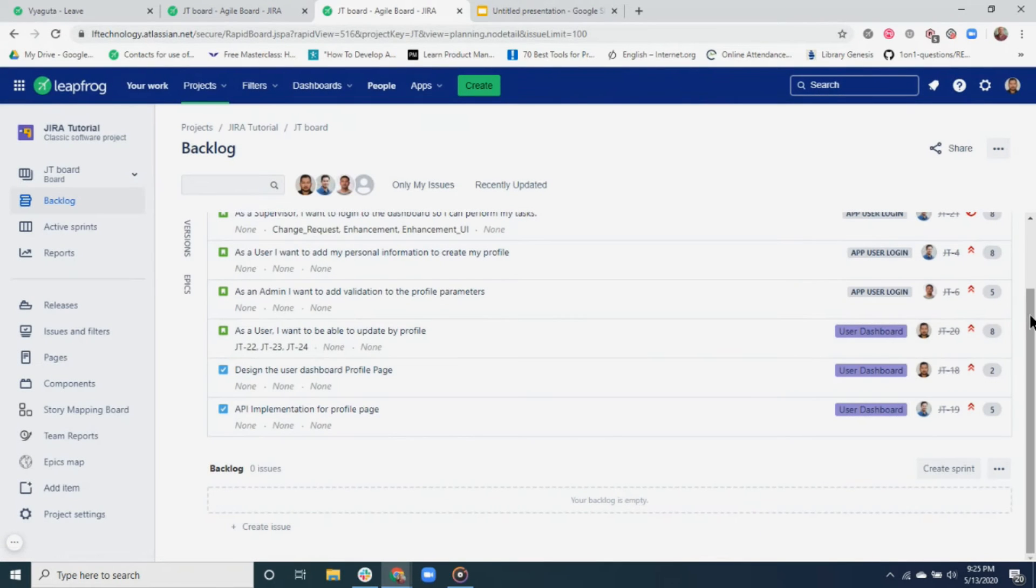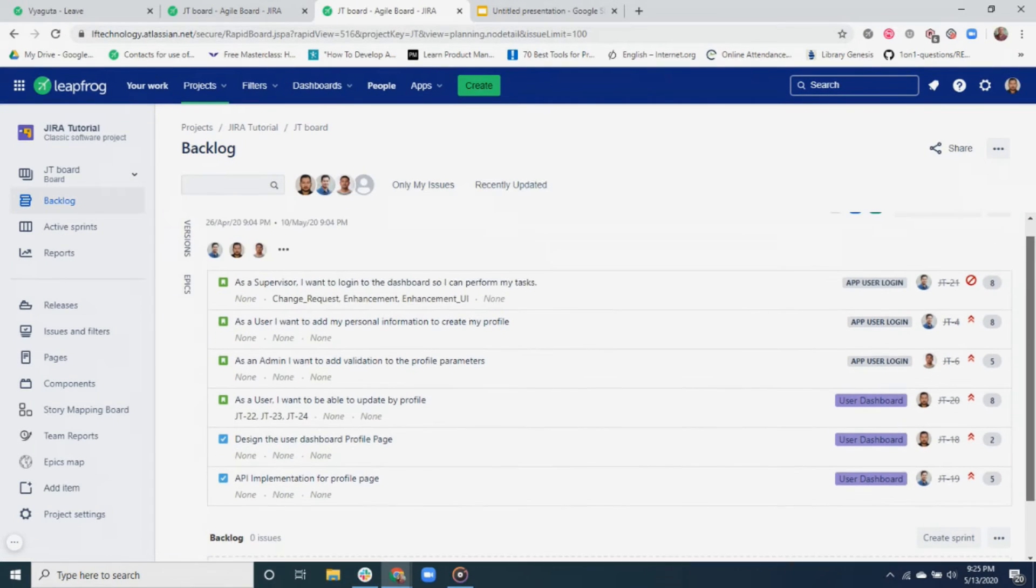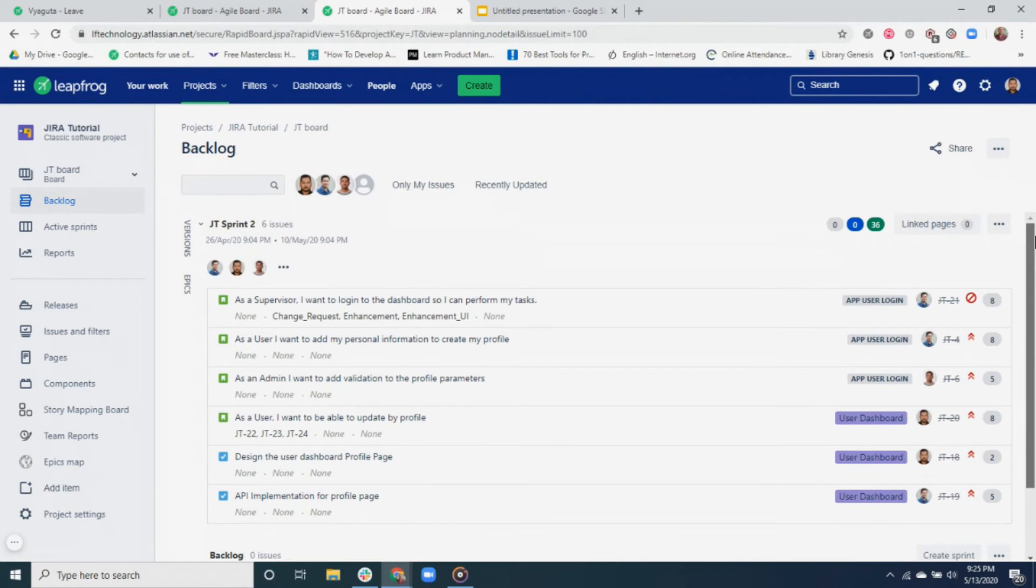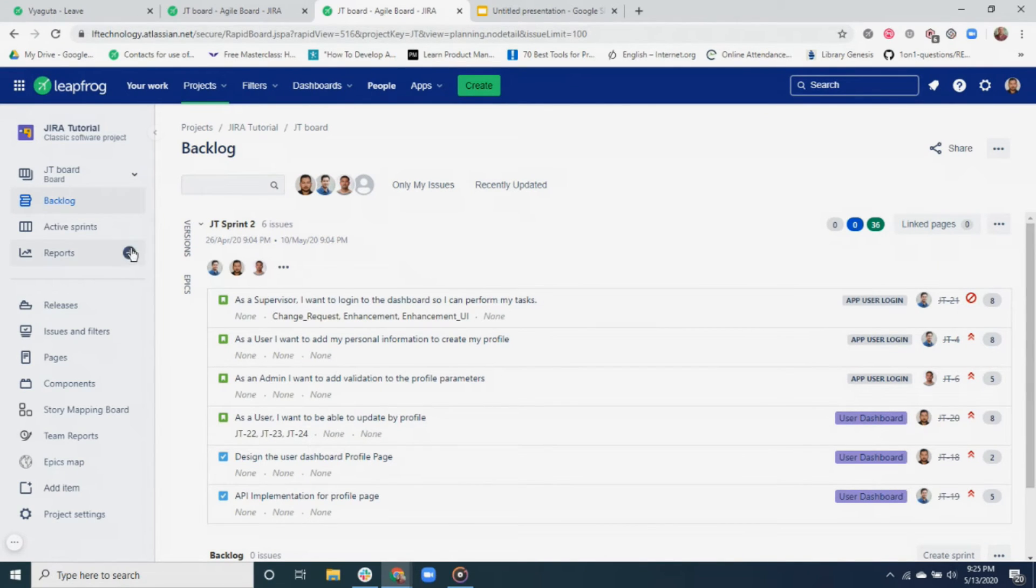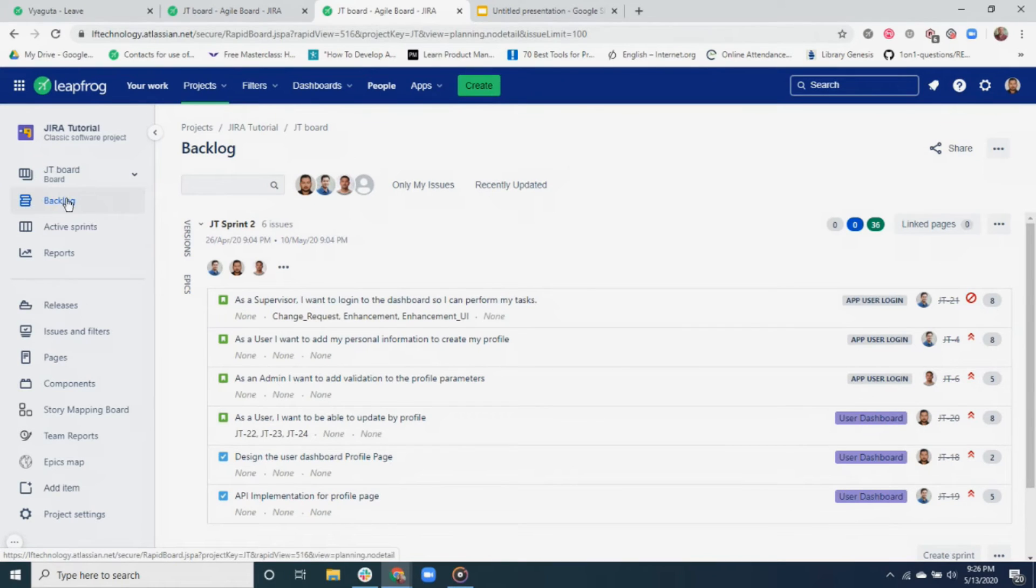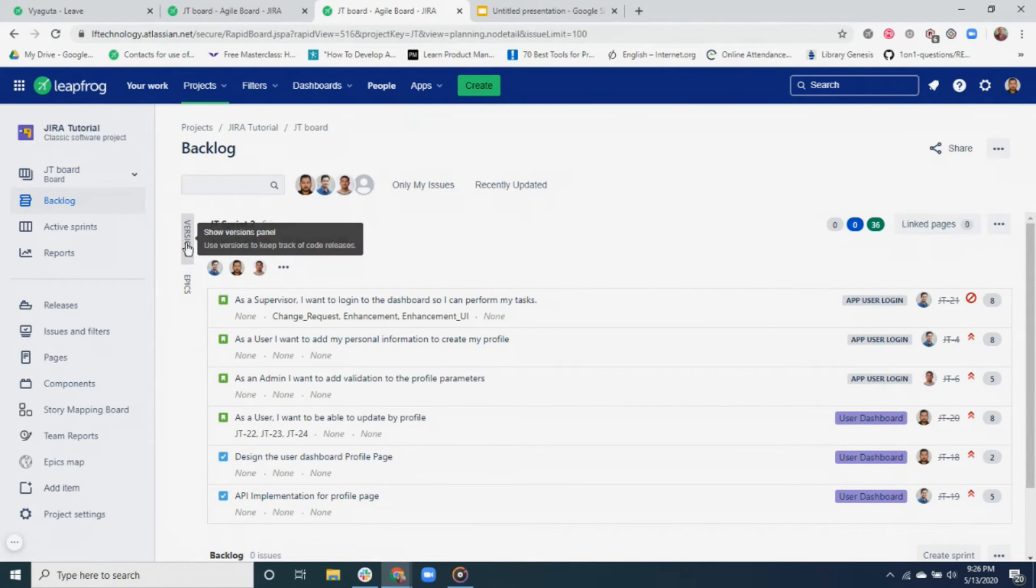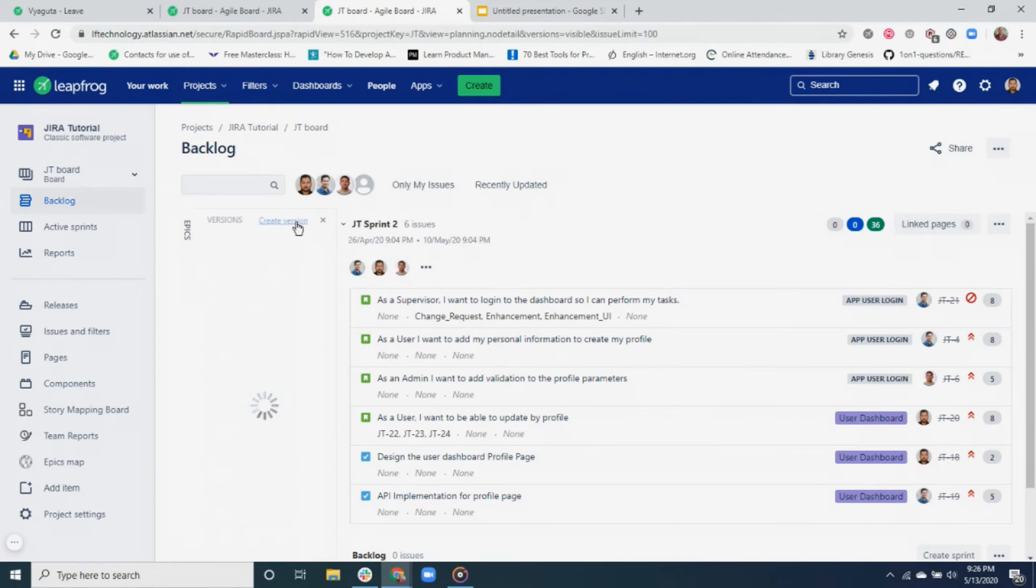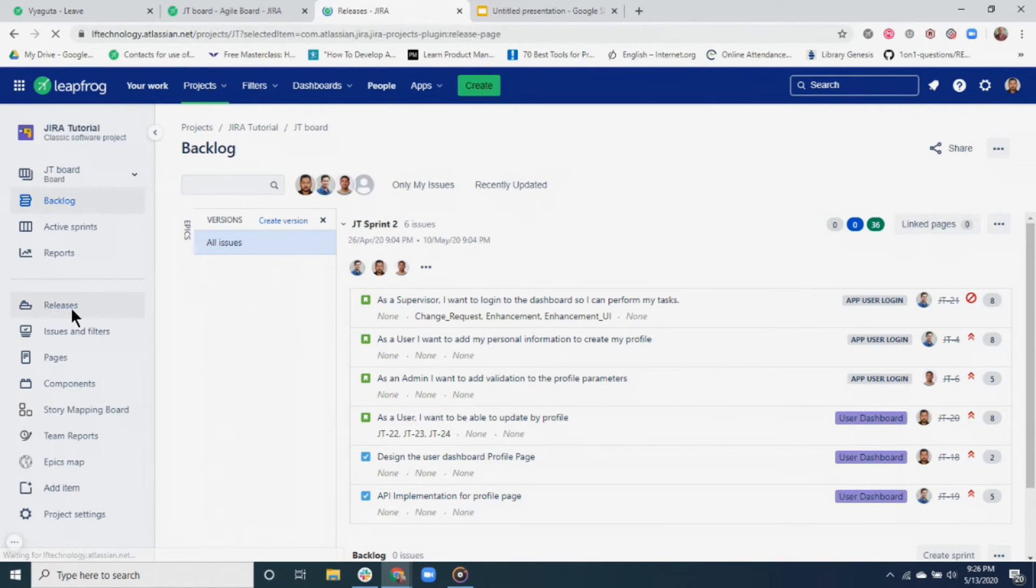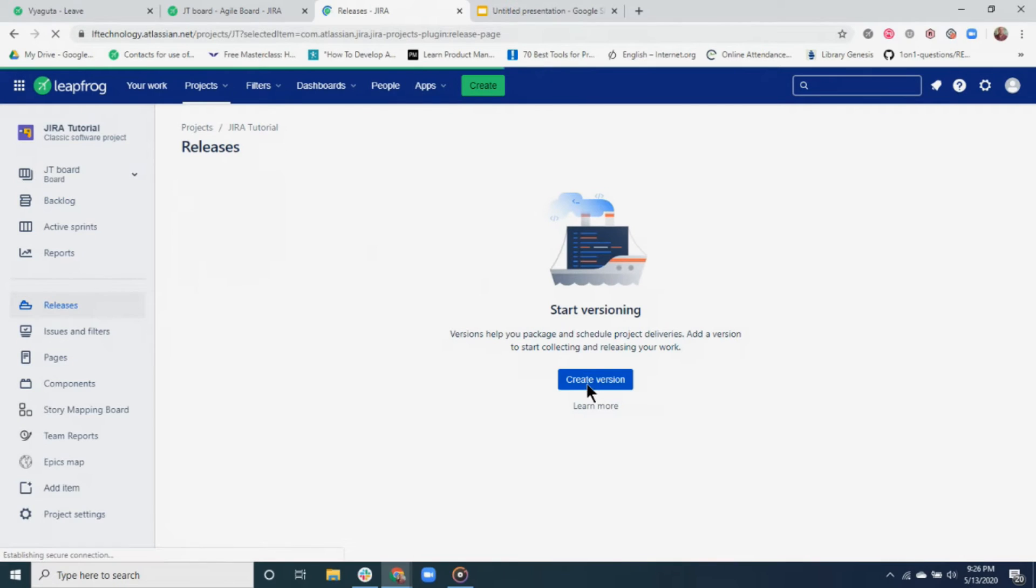Now let's look at how we can create a version and maintain release versions in Jira. There are two ways we can create a version for our project. You can create a version using the product backlog view by clicking on the versions option, or you can go to the release section and create a version from here.